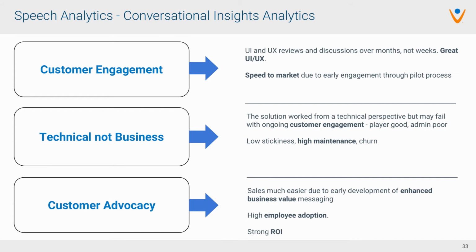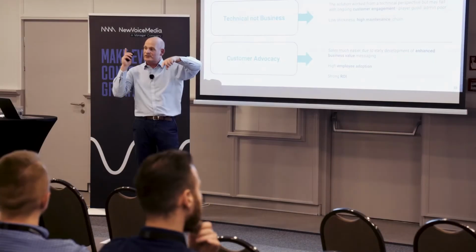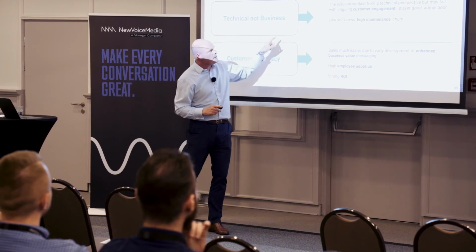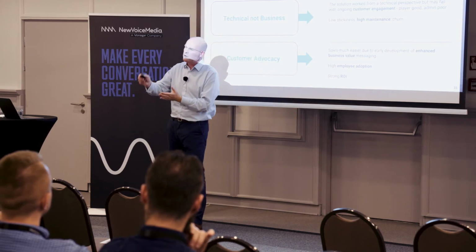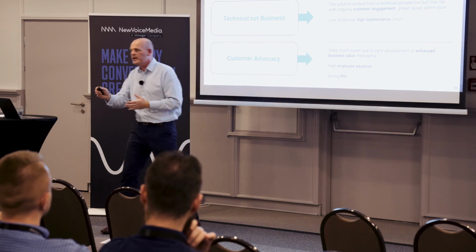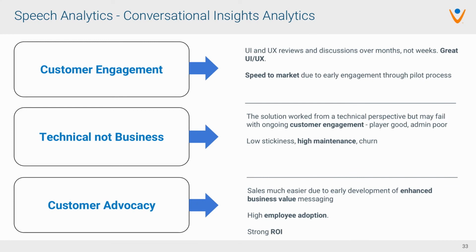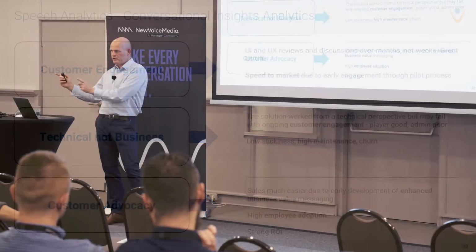But, and there's somebody in the team who helped here, so I'm very aware of what I'm saying now. Technical, not business. If you remember, we absolutely focused on product excellence. With such a tool, you basically have to have, should we call it, the player and the analyzing tool. The player bit, that's absolutely what we focused on, and it was great. Second to none, happily standing up there. The administration tool, we kind of ran out of time because we spent a lot of time on the player tool, not the administration tool.